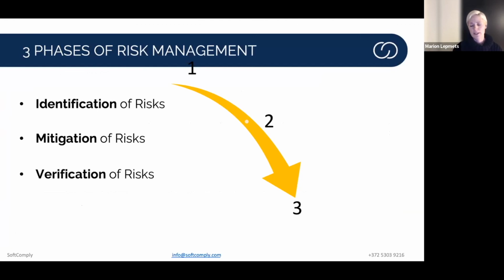And of course, everything, do not forget, has to be documented in your risk management plan first, and then in the risk report. And then you still collect those risks once your product is on the market, to make sure that if there are new risks you haven't considered before, you will have to describe them. And if some mitigations have changed, you need to revise or add to the risk mitigations.